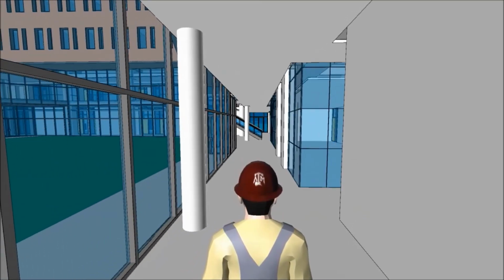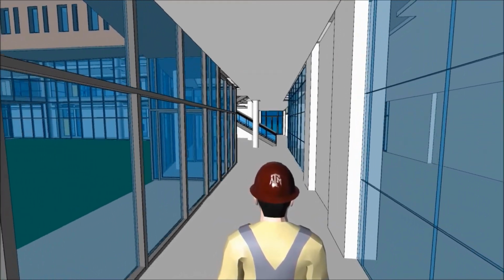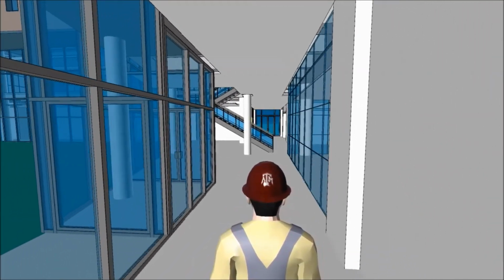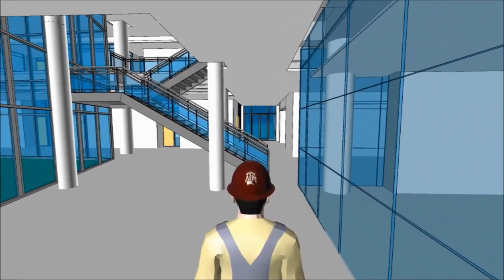The substantial completion date for the project is March 26, 2014. In preparation for this date, the superintendent will compile a punch list for subcontractors to complete. He will also walk the project with local inspectors to receive the building final green tag.